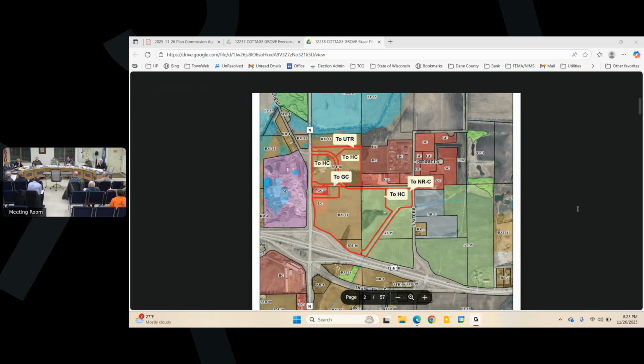He also did have some notes here, which I couldn't see because it was turned around the other way. He said there is another detail describing 80-foot right-of-way in the ordinance, which is currently shown in the plan. I would recommend keeping the 80-foot right-of-way with its current lane widths due to traffic type, as Mike mentioned. And then he said my audio isn't working. The minor collector street cross section is 80 feet with a 34-foot road. 34 feet.